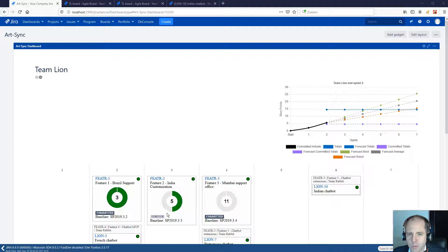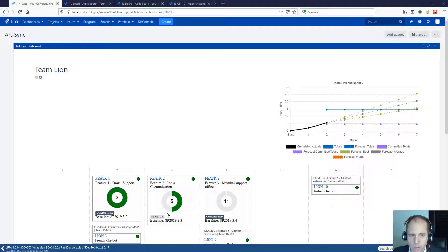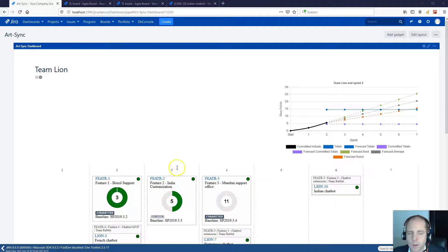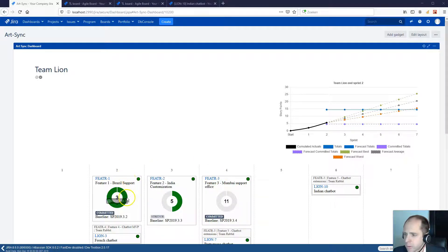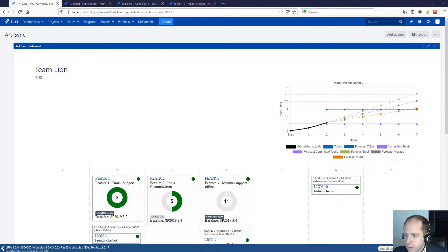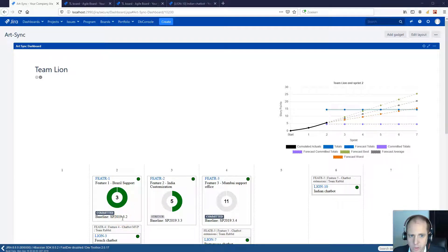The plugin contains a dashboard per team in the program and it has an overview of the sprints and the features. A feature contains a key, a description, a progress of underlying stories, a committed or stretch indicator and a baseline sprint, that is the sprint in which the feature was originally planned.